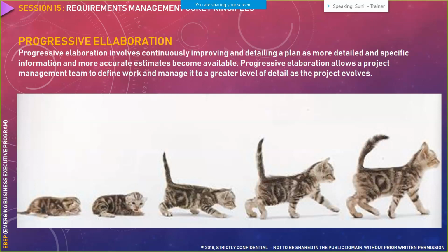lesson to learn about that change is that the product owner always has the flexibility to test various things. For example, let's say he wants to introduce a new feature in a particular market. What he would do is try to implement that feature in three or four different ways in different sprint cycles, and compare the results of these three or four sprint cycles to see which is the best suited way of implementing this particular feature.